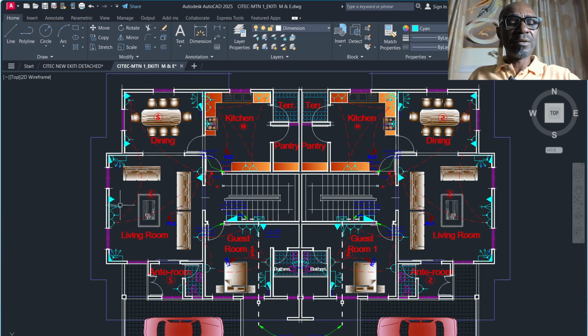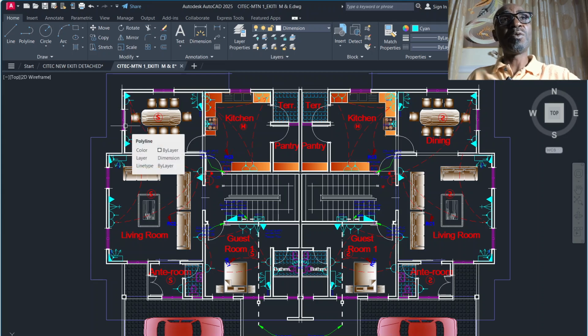As you can see, for power, the cables are looped from one socket to another. So what I need to do is to measure this cable. And how do I measure this cable? Because if you're given a bill and you're not given the drawing for you to determine that, it is only if you can appreciate that kind of building, and maybe over time you've been able to measure such buildings, you can as well say, okay, the average meter to supply one point is so, and you can apply it. But it is always good you measure to know.